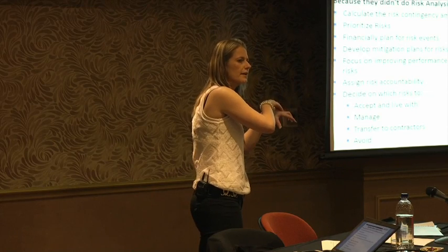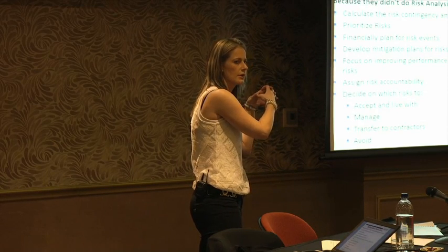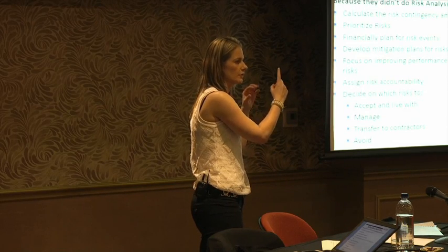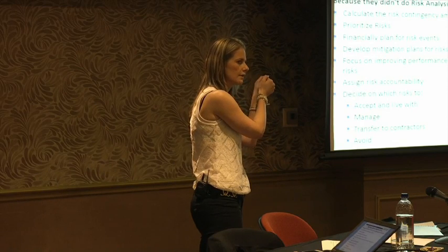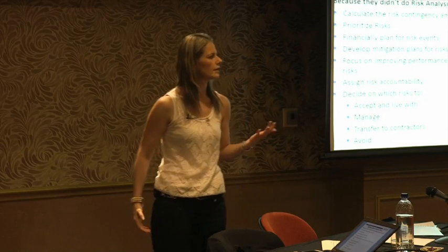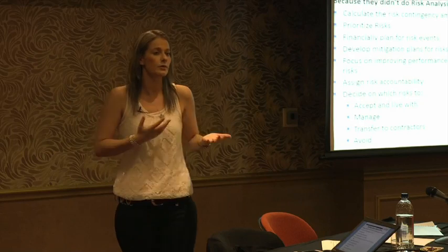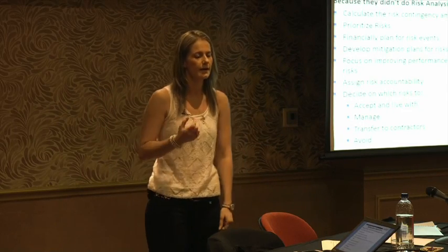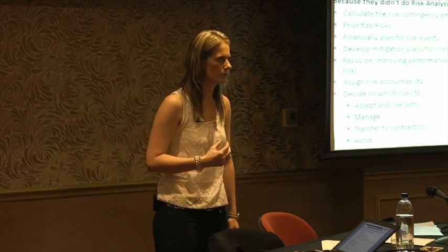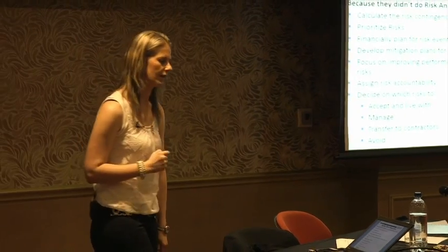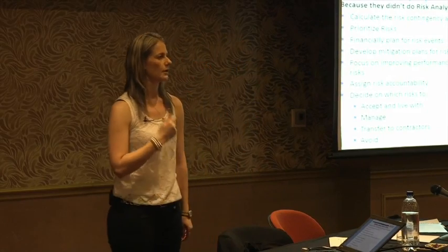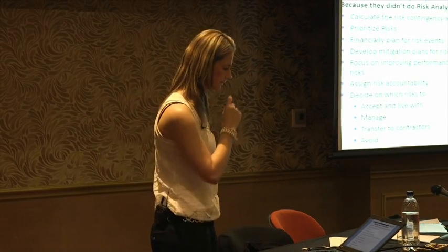And that's why if you have 5 causes to a risk, you should actually have 5 or more treatment mitigations in place. Because sometimes you can have more than one treatment or mitigation idea for one of the causes, but you can never have fewer mitigations and treatments than causes, because it means you haven't addressed all the causes. Maybe at that point in time you're not quite sure how to address that cause, which is fine, but then you should know that you can never mitigate it away, because you haven't identified all the mitigations to all the causes. That's very important, and if we can remember that, we are already winning, in the sense that we will know what exactly to do and what we need to treat: not the risk, the cause.